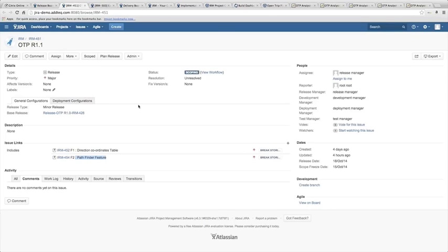They decide to go with an approach where feature 2 would be postponed to a further release, and instead some other improvements or bug fixes of lesser scope can be taken up without pushing the release date of release 1.1. So now let us see how a release plan can be done.